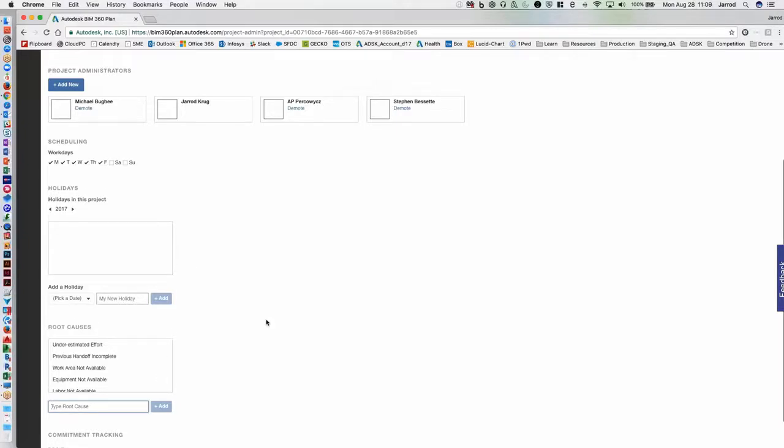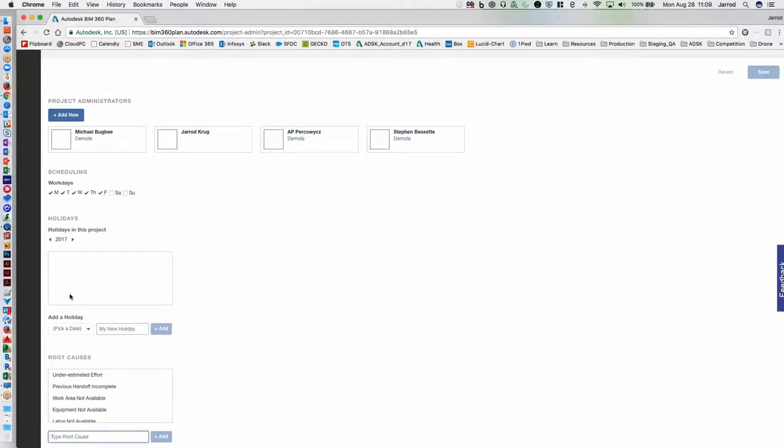Okay. We can also honor holidays on the project. So, for example, if the project itself is honoring a static holiday, a work holiday, we can do that. And once that's put in the system, then we really can't schedule anything on those dates. Basically, the system says we're honoring that, and there'll be nothing against it. Moving up here in the scheduling, we have Monday through Friday.